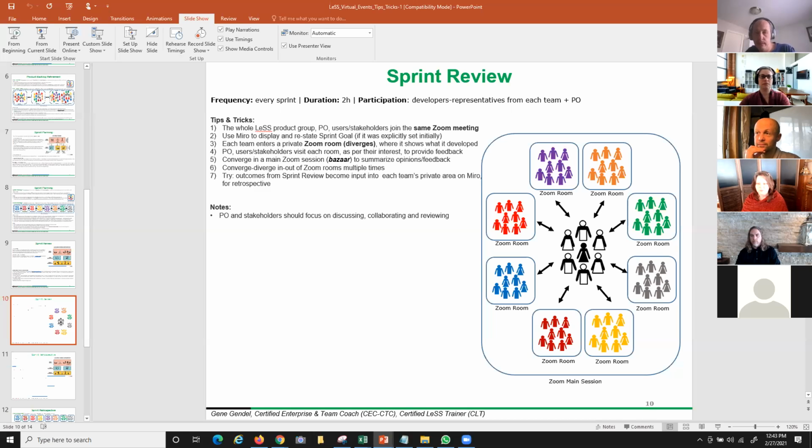Yeah, let me give a couple of tips. If you have a Teams chat going that's overall for everything, you can ping people and bring them to a specific room. Also, when you do the overall PBR, you can start to figure out which discussions are going to be happening where, and make sure people are aware of that. And then, in your daily Scrum with your teams ahead of time, if you really want one member in each breakout session, the team can self-organize in their daily Scrum the day before. Those are just some tips that I've found useful.